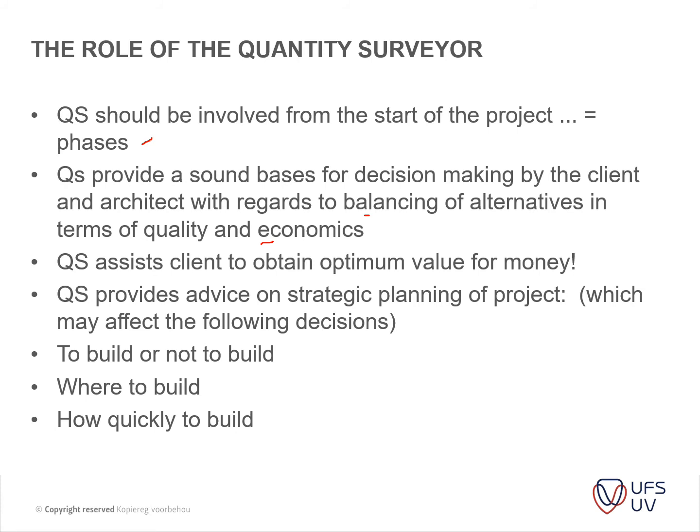Can those sections be produced economically for this building? An example of that is we worked on a pressure tower, water tower here in Bloemfontein at one stage, and the architect specified curved glass to be installed on the project, and it added a substantial amount to the project.